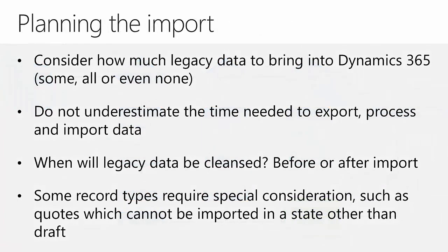In planning the import, there are several things that you need to consider. First, how much legacy data do you need to bring into Dynamics 365? Is it all of the data, some, or maybe even none? It's not unheard of for organizations to start from scratch. You might apply a data cutoff so that data that is older than, say, 3 years is ignored in the import process. Do not underestimate the time needed to export and import data.